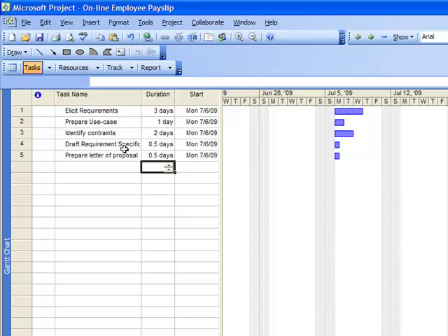Because other activities will not start unless one activity is completed, we need to assign predecessors to an activity that is dependent on another activity. We adjust the borderline that divides our task pane and calendar pane until we see the predecessor column.